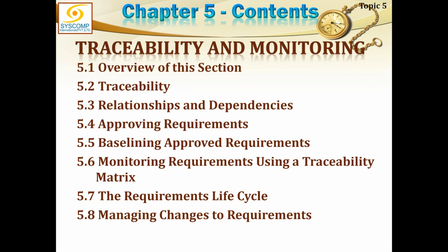You should be able to trace a requirement backwards and forwards. Backwards means from where this requirement has originated, we should be able to trace it back to that place, and forward to the place where this requirement is going to result in a product or output. So we should be able to look forward and backward, and if a requirement changes, then we should be able to see whether this affects our project objectives, scope, time, and cost or not, and which of the stakeholders are still on or not. So stakeholders will also be changing. That is one part of it.